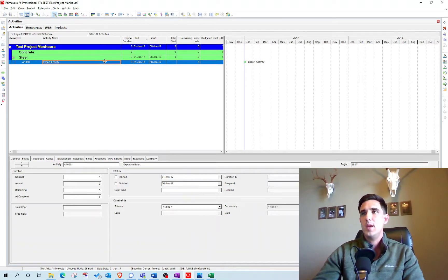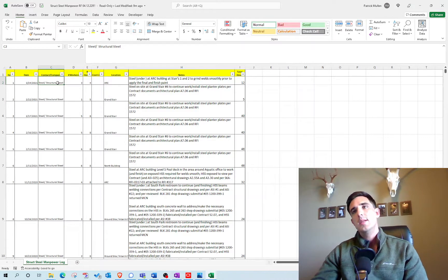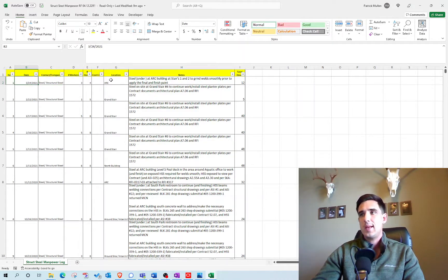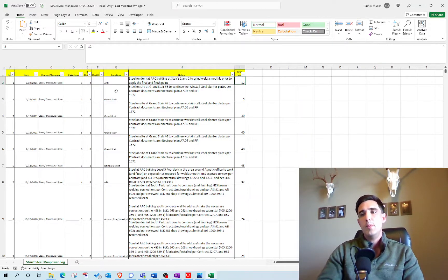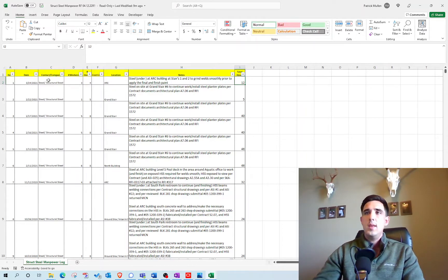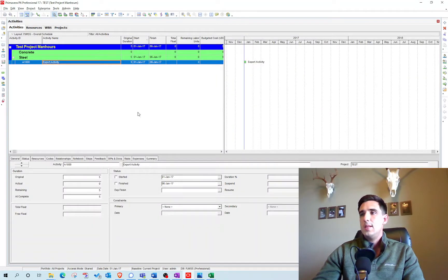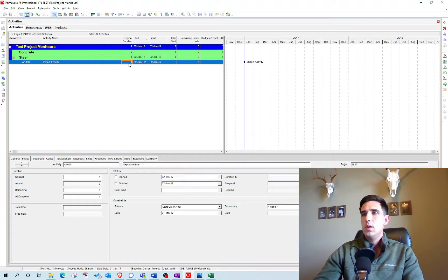That export activity is just so that I have the right information when running my import. What I'm going to do with this Excel file is add one activity per day as a one-day activity. I'm going to use the primary constraint — specifically a start on or after constraint — on each activity to hold it in place on the specific date. So I'm going to make the example activity a one-day duration with a start on or after constraint. Then we'll create our export template.